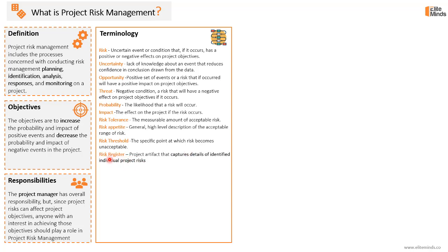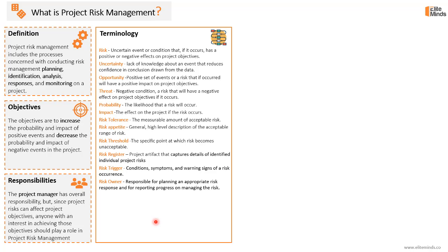The risk register is a very important project artifact where all identified individual project risks are documented with all relevant details. If you want to know the risks in a specific project, you just ask for the risk register. The risk trigger is defined as conditions, symptoms, and warning signs of a risk occurrence — an early warning sign that a risk is about to occur. The risk owner is the person responsible for planning an appropriate risk response, reporting progress on managing the risk, and ensuring the response will be implemented once the risk occurs.